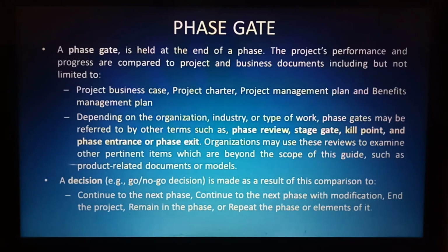A decision is made as a result of this comparison to continue to the next phase, continue to the next phase with modification in the project, remain in the phase, or repeat the phase or element of it.